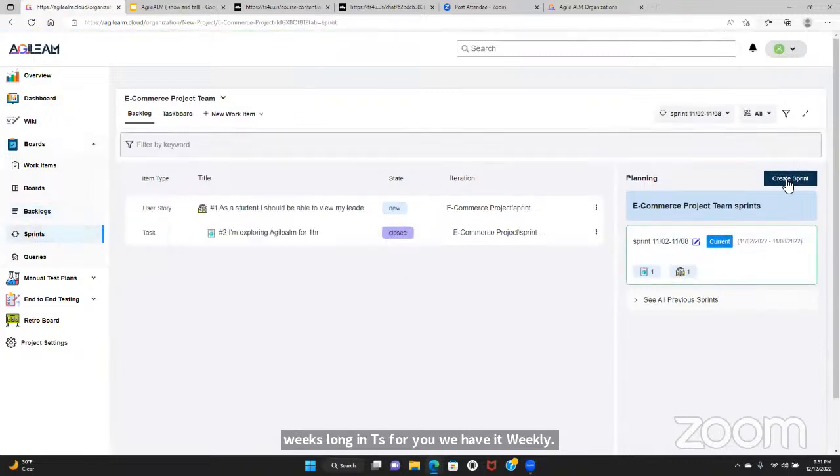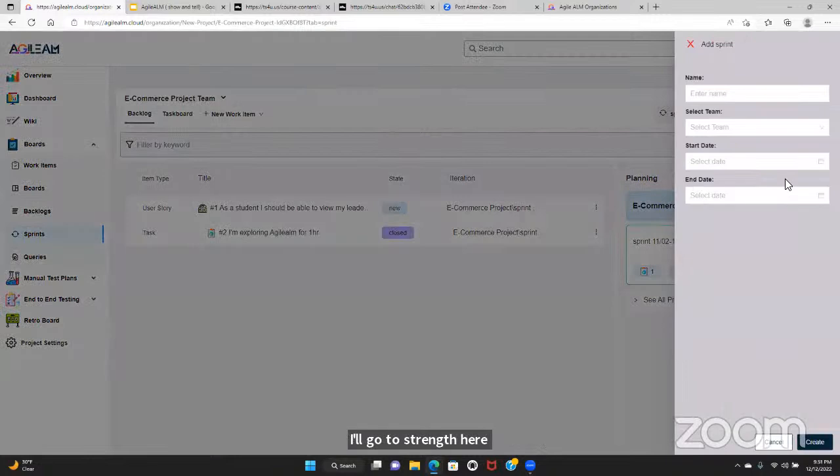I will go to sprint. So what do you do in the sprint? What is the sprint planning meeting? Can you describe these details? Yes, in the sprint planning meeting, the whole team gets together and talks about which user stories they're going to work on, and they estimate their work efforts. They come up with accumulated hours for everybody together. And then they start working on it, and then the sprint starts.